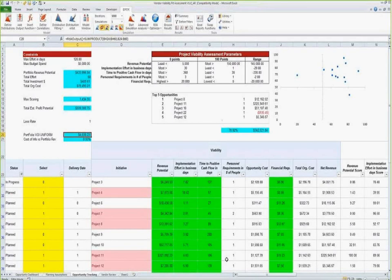And when we do this, we know that this particular portfolio, if we wanted to get close to achieving our mean results, we're looking at a $4,000 investment. So if we don't have the $4,000, if we have to put a constraint, say, well, I only have $3,500 or $2,500 to invest, that's fine. You put that in, and then it will construct your portfolio in that regard. The same can be said with how much actual investment, how much capital expenditures you can allow.